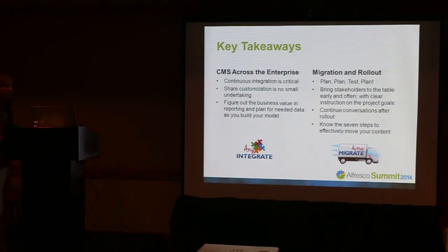And we sat with them looking at their legacy data for quite a long time and planning migration for that. How are we going to get this metadata out of an old database? How are we going to move it into Alfresco? And we planned and planned, we tested, we realized all the things we missed, and then we planned again. So that's really critical as you look at migration.